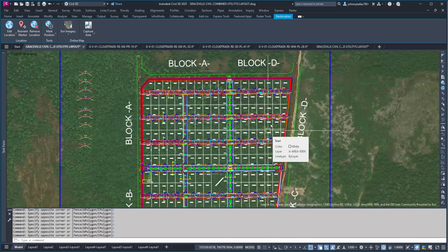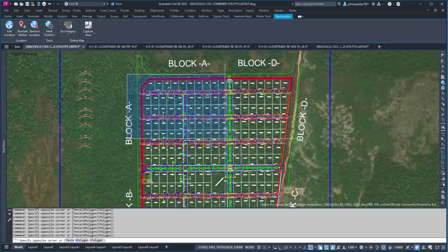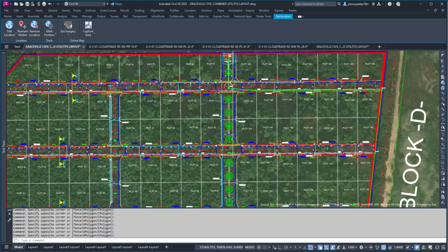You can, but it's much better for the dredger to do it. For example, this road, not only to do only at block A, to do all the road, because when the dredger is pumping the sand, he will pump the sand with water. You get my point? So I don't want, for example, to do this road and later bring the dredger back to do this road. So the water, it will affect the daylight for this road. Okay.